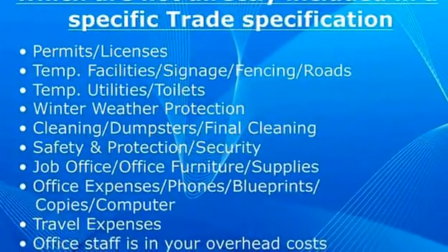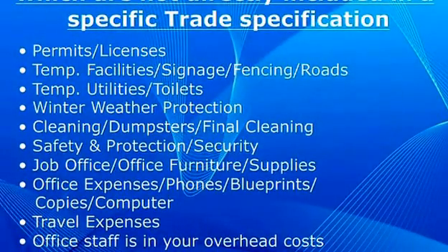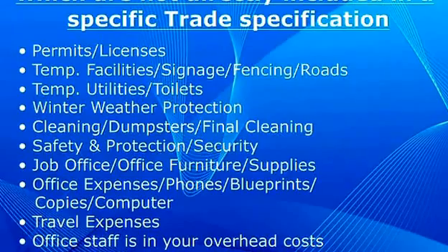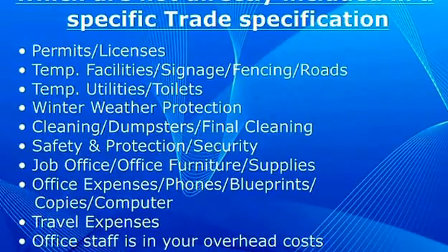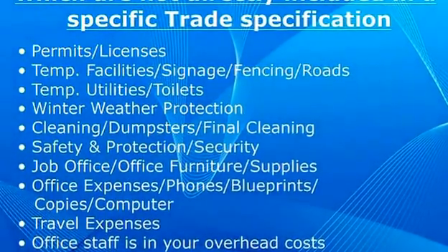Temporary utilities and toilets. Obviously, you got to have running water for the masons to work, concrete guys, plumbers. You got to have bathroom facilities for everybody on the job. And obviously, you need to know how many months you're going to need these facilities. So that's why your schedule ties in again. Grant talked about temporary sanitary for a trailer, for an owner or a CM. It's something you got to include there. That's part of your temporary utility costs.